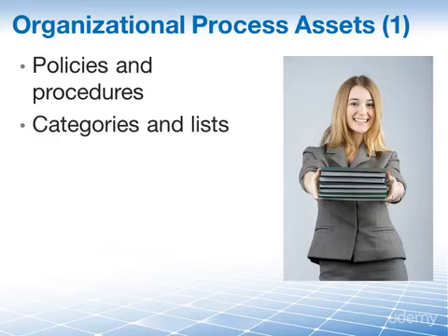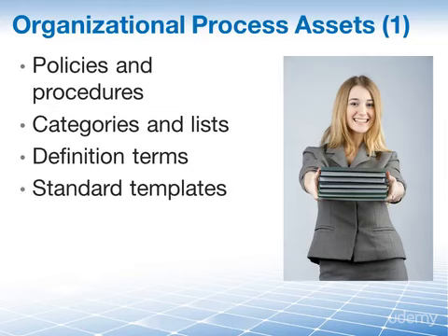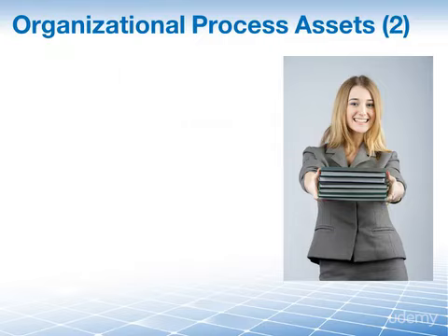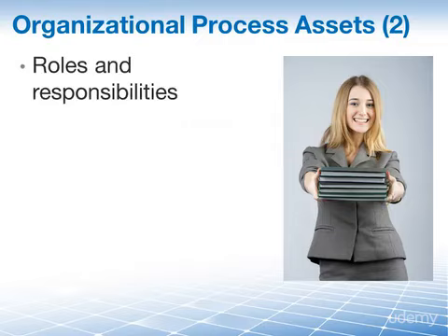Risk categories and lists. Maybe your company has risk categories or even complete listings of possible risks on certain project types. Or maybe your company has a glossary of risk terms that you can use to educate your stakeholders in risk management. Your company might even have templates for risk management activities. These might be as simple as a template for your risk register. Or your company might have documented roles and responsibilities for risk management.